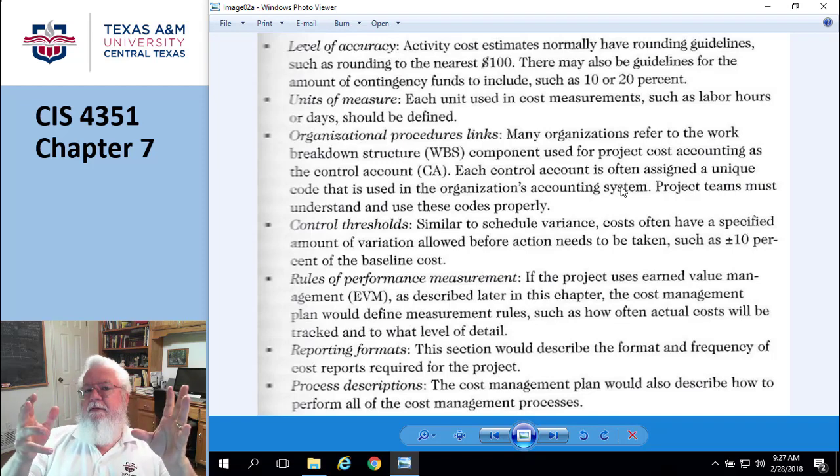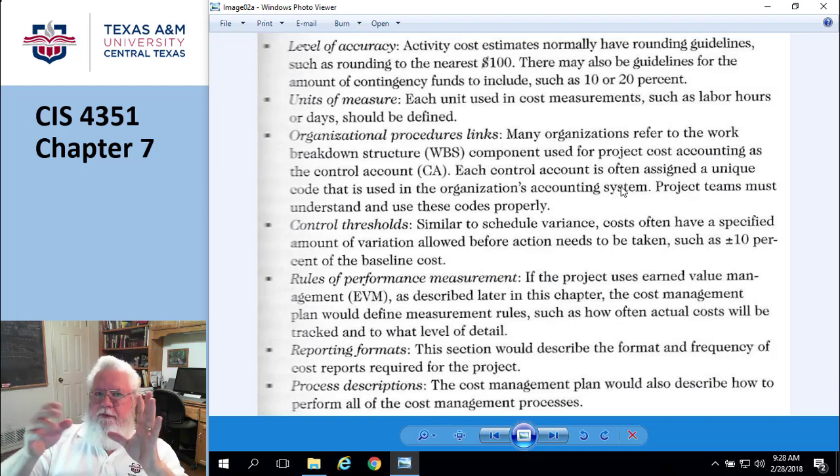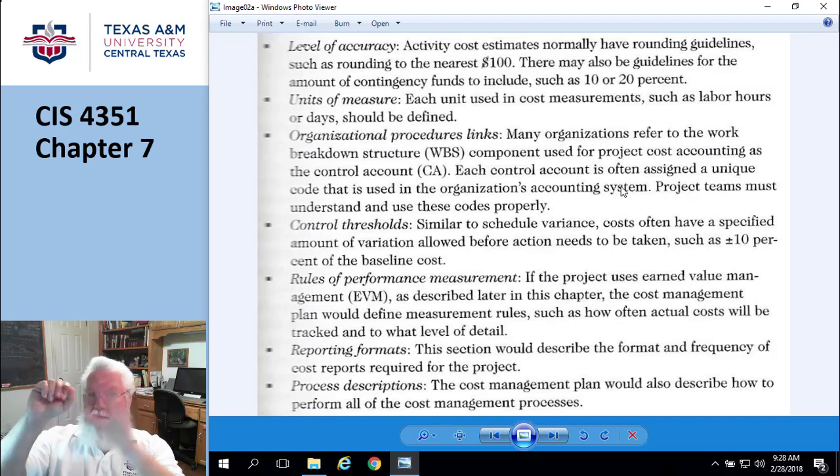It's very likely that, for example, if you're in an organization that charges customers, like you're an outsourced company working on 5 different projects with different companies, then they have cost accounting codes that you have to charge your time against. So your WBSs may be coded to a customer account. So it's not just programming, getting requirements. It's getting requirements for customer A. So it could be your WBSs are designed for cost accounting as well as the normal kinds of things that we're talking about.